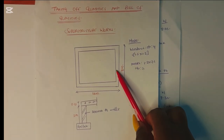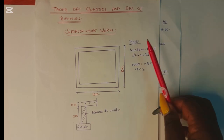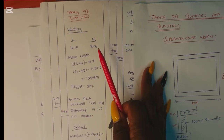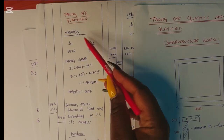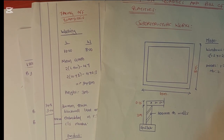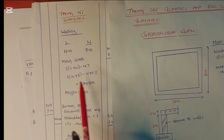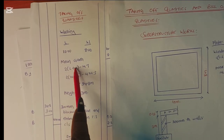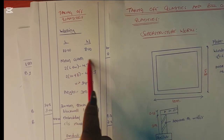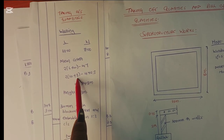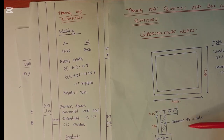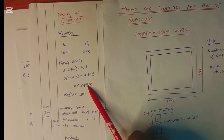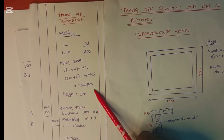We are going to prepare a direct bill — we will avoid the abstracting for now. We are taking off the quantities: we are measuring the walls and the slab only. For the walls we need to get the mini gut, that is the perimeter along the center line. That is 2 into (10 plus 8) minus 4 times the thickness. The thickness is 300 millimeters, so when we subtract that we get 34.8, and our height is 3 meters.